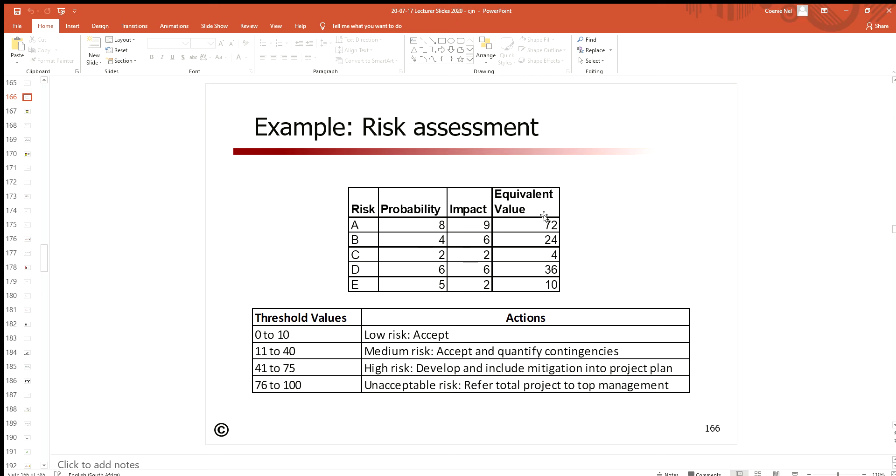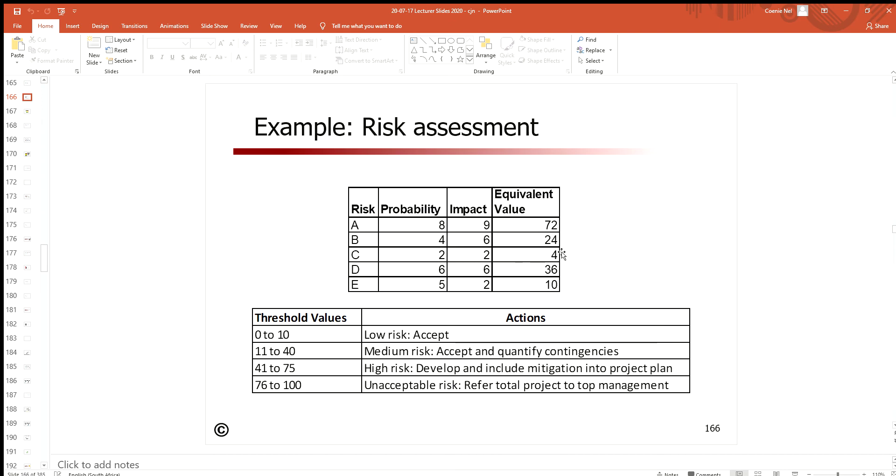If we multiply these with each other, we get an equivalent value. This equivalent value is now something that we can compare different risks with each other. So if this is probability 10 and impact 10, your maximum equivalent value that you can get is 100.